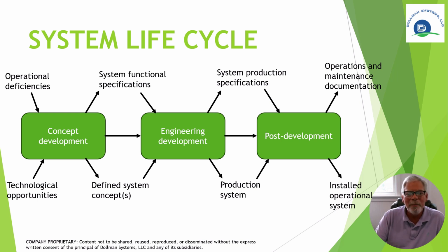Technological opportunities and operational deficiencies serve as inputs into the concept development phase, and the outputs are system functional specifications and a defined system concept or concepts. The system functional specifications and a defined system concept or concepts then serve as inputs into the engineering development phase, and the outputs are system production specifications and the production system.